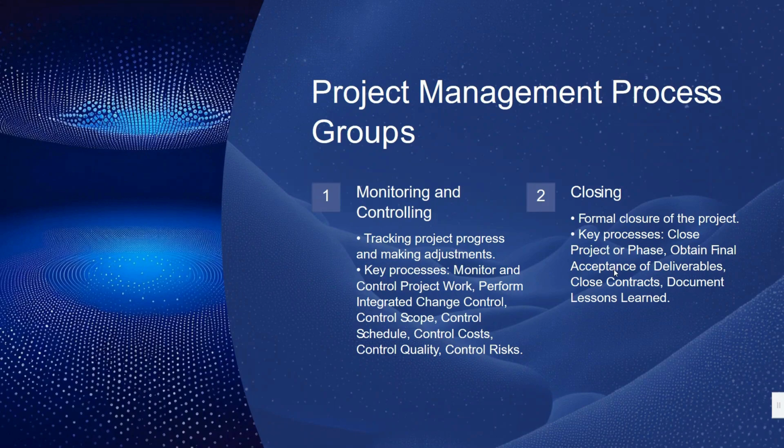Okay, so when we talk about the key processes for the closing phase: close the project or phase, obtain final acceptance of the deliverables, then close contract and document lessons learned. Okay, so you can see here acceptance, close contract, document lessons learned.